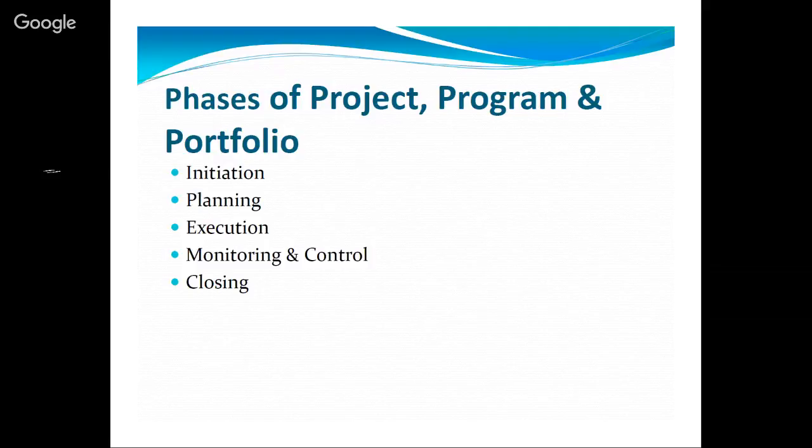And when you come to the closing part of the project, you may want to align and make sure that you are doing the right thing. This is where what we call post-implementation review comes in. Before you even close the project, you may set yourself up to do the post-implementation review, which we call the PIR. The PIR is just looking at the project and looking at the financial aspect and saying, each of the functionalities that we intended delivering, how have we delivered those functionalities? And is the financial aligned with it?